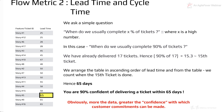In the past, we have delivered approximately 17 tickets. 90% of 17 is approximately 15 tickets. Arranging all lead times in ascending order and looking at when the 15th ticket is delivered — in this case, it's 65 days. So I am 90% confident of delivering a ticket within 65 days, even though the average is still 47 days. Between 47 and 65, there's a gap of approximately 18 days. If the customer wants more confidence — 95% or 98% — you need to adjust the metric accordingly.